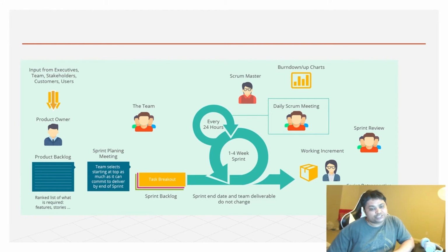Before the sprint starts, somebody from our team plays the role of the scrum master. In some teams or companies, scrum master is generally a dedicated role, but for us, we play the scrum master role. Sometimes I can play it, sometimes my colleague can, and we rotate that role as developers. We sit with our product owners and talk about which user story we are going to pick, and which story has full acceptance criteria, or has had all the grooming done.